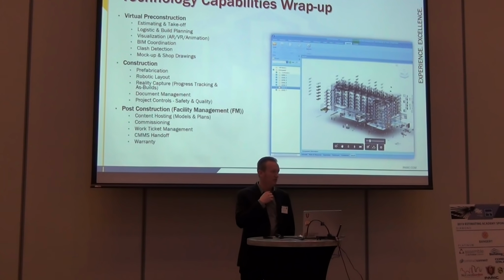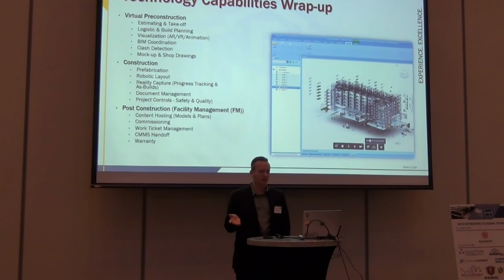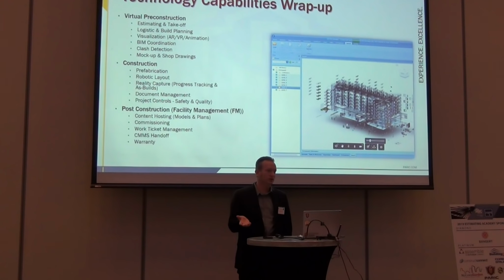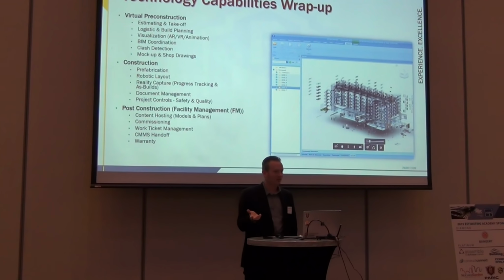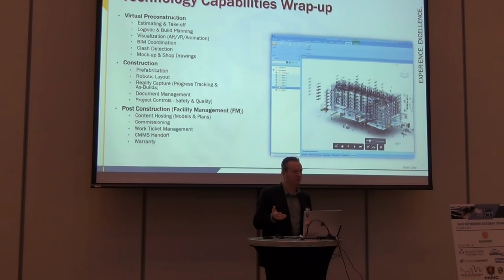That only comes with some confidence from the project team, so now they're using robotic layout because they're prefabbing and they want these things to fit. They don't want to have a waste factor, right? Their goal is 0 waste factor, right? No more 1%, 10%, 15%. My mechanical contractor wants 0 waste. That's the goal. Well, if I can get to close to 0 waste, that's doing something.